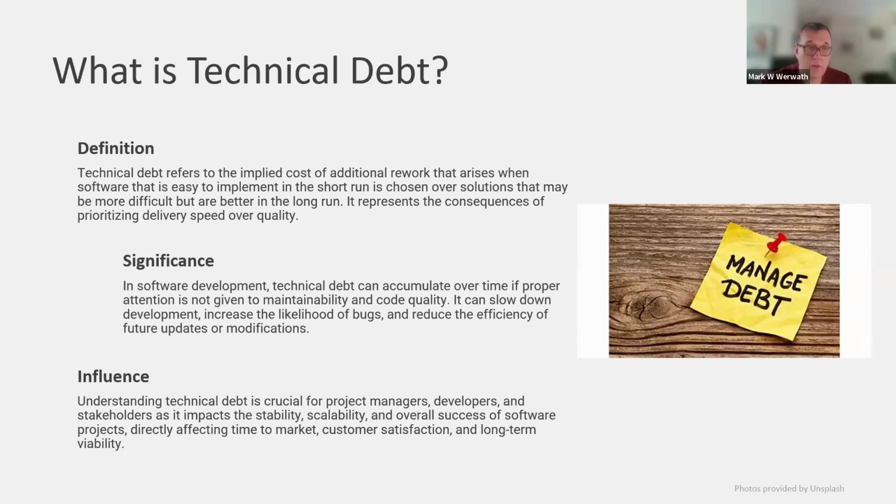That's the point, right? Understanding technical debt is crucial for project managers and project developers, and I would argue as well, engineering managers and stakeholders that are also impacted, because it impacts stability, scalability, success of the software projects, time to market. Your schedules are impacted, right? If you have a certain defect density in your code base that is higher than it should be, that will elongate your schedules.